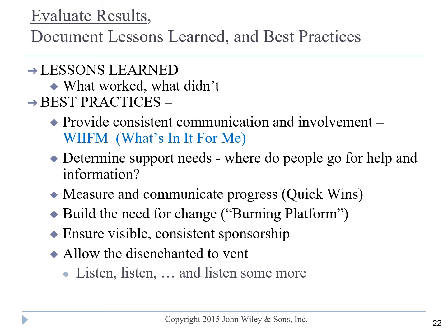Similar to many other project management knowledge areas, in change management, after you implement it, you need to evaluate the results, find out what we learned from it, what worked, what didn't work, what were some of the best practices, and make sure that those are documented and made available to others who will be leading similar changes in the organization in the future. In general, there are several practices that are identified to be pretty effective in change management.